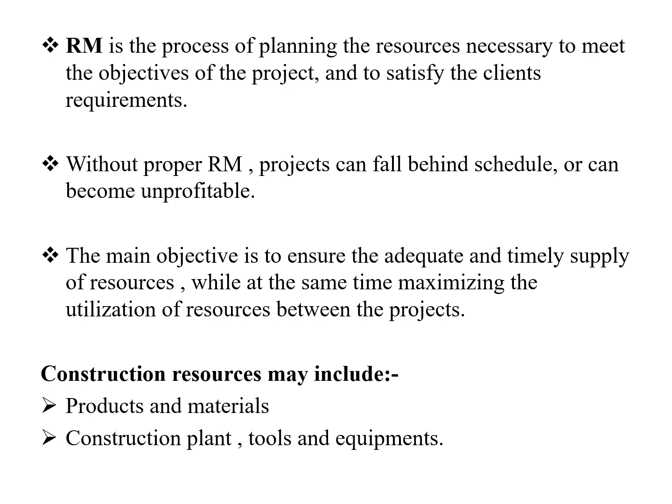If you are not storing that cement, you know what will happen. If it is in contact with the atmosphere, it hardens and lumps will be created. That kind of cement will not be used for any construction work because the strength will decrease. So that's why you should plan everything well. That's why management is very important.